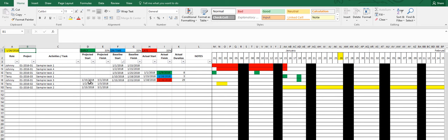And I have those projected dates come up in a yellow color. So if they're yellow, that means that they haven't been baselined, or they haven't been assigned to you, or you haven't assigned yourself officially yet. And the official ones will come in red, and then as you complete them, you'll lose the bar, and it'll just be a start and a finish date in green.